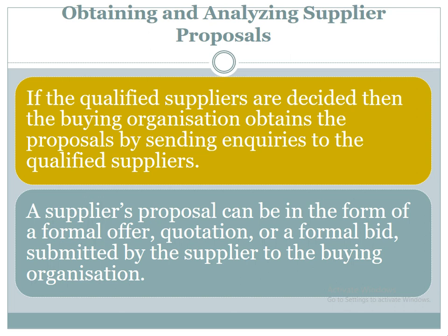It must include the product specification, price, delivery mode, payment terms, taxes and duties applicable, transportation cost, maybe freight or cost of transit insurance, and any other related cost or free service provided. So all this information should be mentioned in that quotation or maybe formal offer.